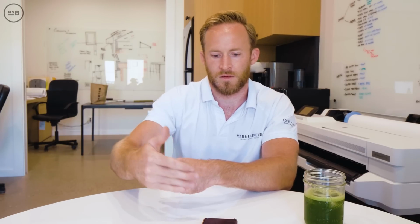But now here's where the question wants me to dig into a little bit more. Well, what if you do estimate 100 hours and you're starting to trend more than that 100 hours? That's in the agreement, and it explains that we're going to track our time against this fee, this retainer, we call it. We're going to track our time, and as we're tracking it, we're going to be having these meetings with clients, and essentially we want to have a meeting where it's, hey, the design is so far along, the budget's so far along, the schedule's so far along, and ultimately we want to get to a point where they make a decision whether or not to build. And hopefully, and most of the time I would say it happens before that 100 hours is up.